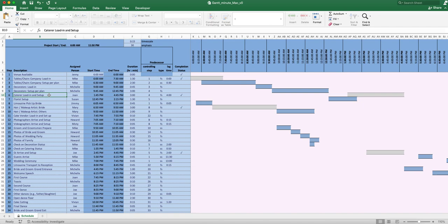the caterer can come, but she's not really depending on the decorator to be completely done before she starts. Her relationship is more that the decorator just needs to basically have loaded in. She's gotten all of her stuff loaded in, because then she'll be out of the way of the dock, and then the caterer can come in with her truck and use that dock, and that's why it's basically coming to get a hold of that dock and start loading out her materials.